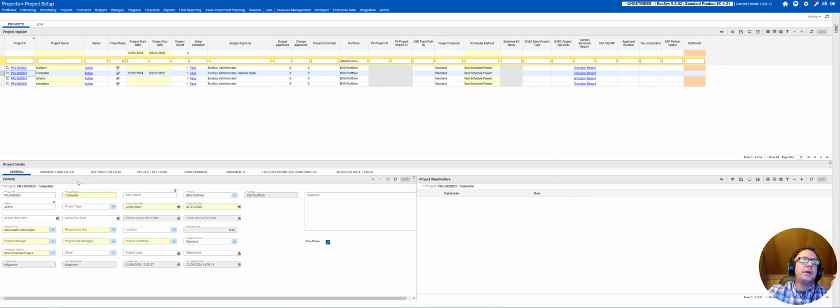If these things have to be set to cross, then in that situation, when that user clicks on a given project, these objects down here share with that session context, hey, root cost object equals Tumwater.